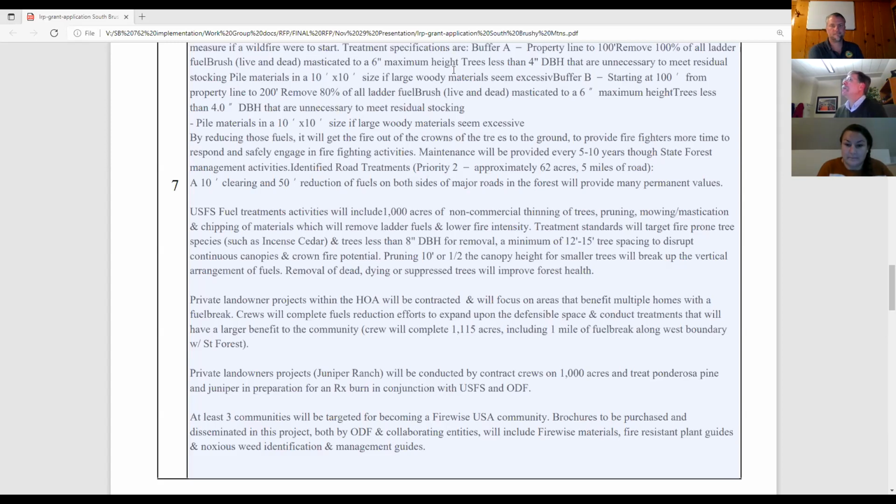that really wasn't brought up, but I will say this, that typically our grant programs that we've seen across the landscape, east to west and north to south and different landowners, typically it's about $1,000 per acre of treatment. And so when we're looking at multiple million dollars going towards a project, we would expect the acres to match about what that rule of thumb would be. I hope that got to it.